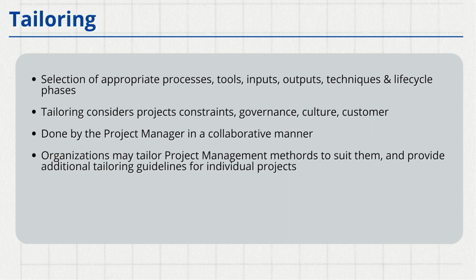For example, let's say we were working on a project with very high complexity because multiple stakeholders were involved. Not only that, but these stakeholders were also from different time zones. We had to use certain tools to ensure that all stakeholders collaborated effectively because that was our biggest challenge. Hence, we started using tools such as Confluence and Jira.